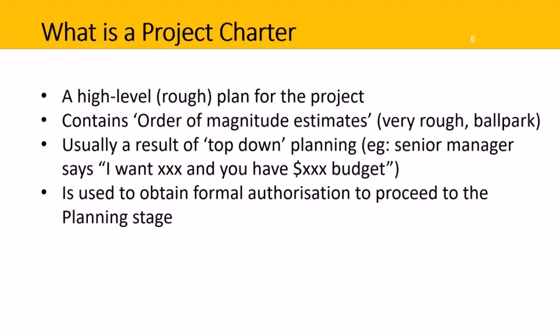So, for example, a senior manager may say, I want something produced, and you've got X amount of budget to do it in, so some high-level statement about the project. And it's used to obtain formal authorization to proceed to the planning stage. So that means we don't spend a lot of time on it, otherwise it may not be approved and we've just wasted a lot of time on something that we're not going to proceed with.